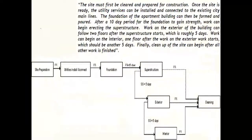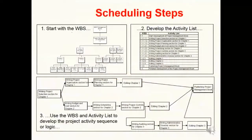Key steps in scheduling: we start with the client to understand requirements and identify the Work Breakdown Structure — much like an organizational structure — to develop a clear understanding of key work packages and their relationships. Then we identify the activities and put them in a logical relationship to develop precedence diagrams.